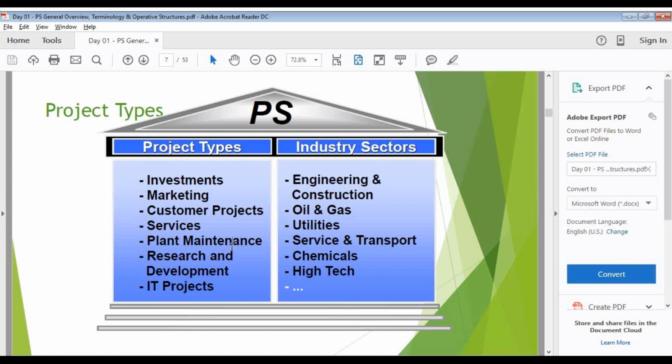Whether it is an investment project, a customer project, or an internal project. The only thing is that internal projects and investment projects don't have customer profiles. I mean, they don't have the revenue recognition items with them. RA will not be done on internal and investment projects. RA will be done only on customer projects. Okay.